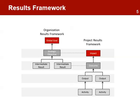A results framework can include global goals, region or country goals, and the sector or program goals that the project will contribute to achieve. Each level of results will have its own predefined results indicators. These indicators are defined in the strategic framework and all projects in organizations align the results framework to these indicators, ensuring that results obtained at the project level contribute to results at the organization level. For example, the outcomes of a project framework can be aligned to the intermediate results of the organizational framework.